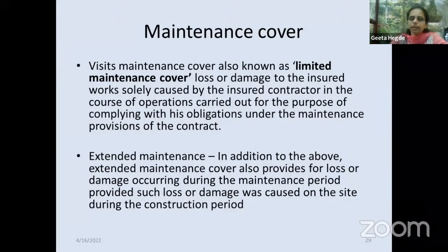So extended maintenance covers the visit maintenance cover. That is the loss which takes place due to the obligations for complying with the maintenance provision. Additionally, what is covered in the extended maintenance is some defect which has actually caused the loss, where the cause of loss is already there in the construction period, but the result is in the maintenance period. That is the extended maintenance additional cover.